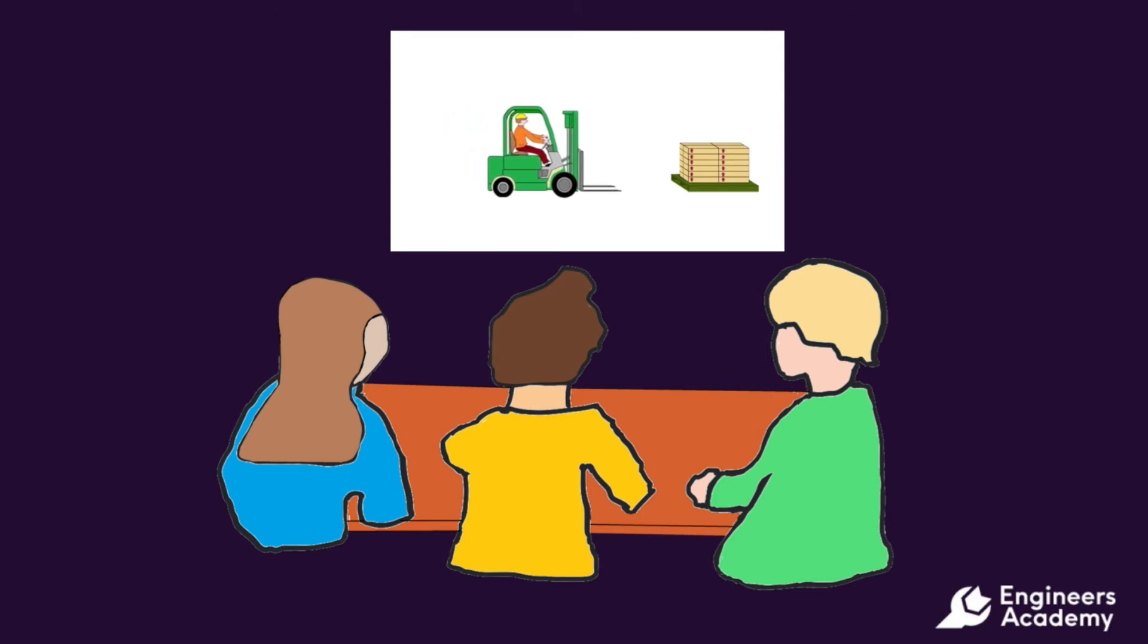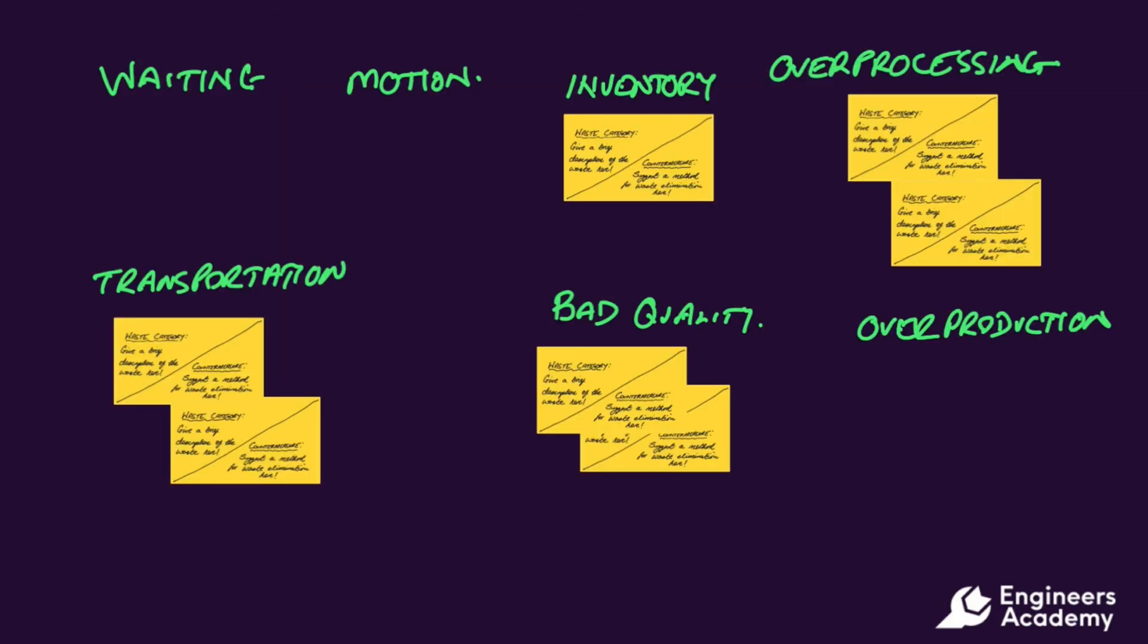Sticky notes are used to record each observed waste, one note per waste. The sticky notes are placed onto a chart. The chart is then used to prioritize the waste for order of elimination.